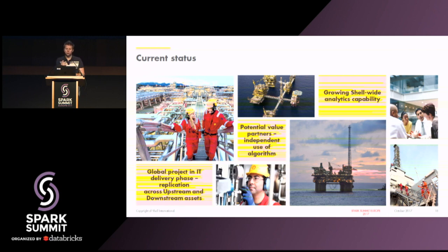That was what they wanted us to solve for them. What we then tried to do was do 2 things. Wayne did some initial exploratory work to say, can we actually build an algorithm based on the data that will help set those reorder points? And then the second thing we did was develop user stories and a product backlog around what data they want to see to help them make that decision.